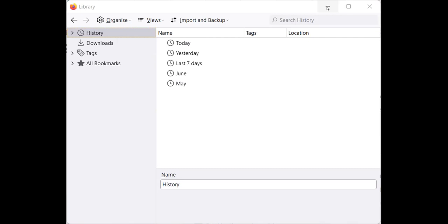You need to be specific. What I'm doing here is time management. I'm just using this project to do my time management. I specify the time. When is this going to be due? So this should be due on Friday. So when this particular activity, for instance, on Saturday, which is on the 9th, and this guy, Chrisa, has not submitted this particular activity, this will trigger off.